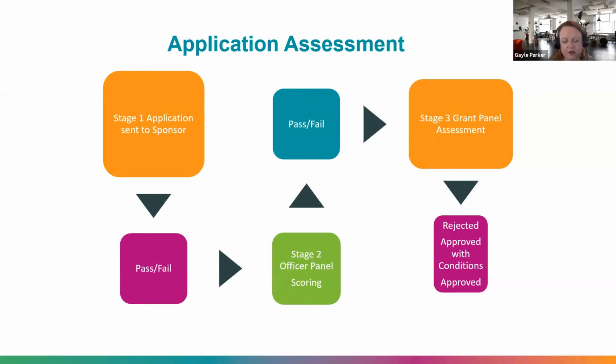Now, this is all going to happen over the next month, 6 weeks. So it will be around the 1st of September that we're looking for projects to actually start. So do bear that in mind when you're writing, particularly in your milestones section, and also the section that talks about when you're actually going to have your cohort starting, etc. You need to allow yourself enough time from that award of contracts, so let's say the 1st of September, to do your recruitment and then to start your cohorts. So do bear those sort of timescales in mind when you're thinking about your milestones particularly.